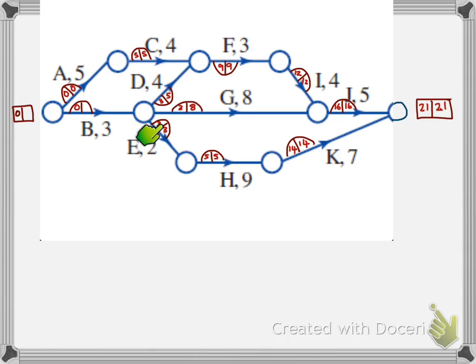And the other one, we want to fill this one out. Aha! Now here's where we've got to be careful. There are 3 activities that trace back to here. So what we have to do is subtract 3 from each of them. The lowest number is what we're going to put in as we go backwards. You might remember when we forward scanned we put in the largest number, or the longest activity. Here we're going to go back and put the smallest number in.